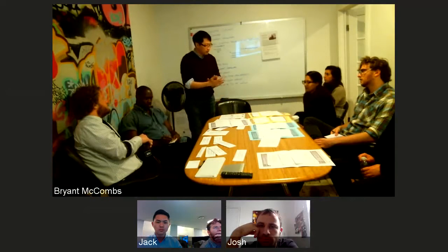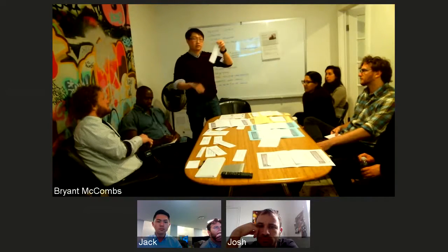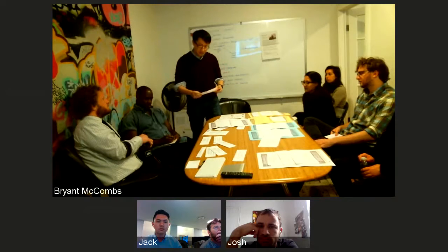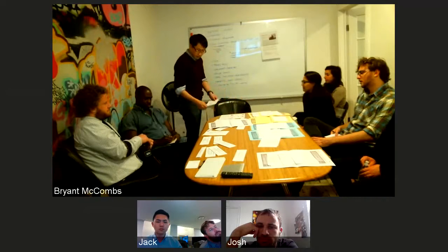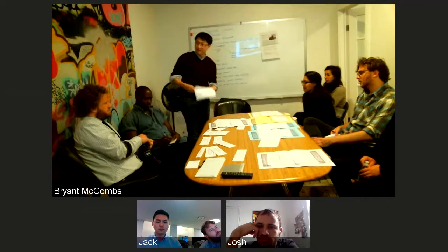So every week, this would be regenerated by the project managers. Sometimes cards would end up smaller after the previous week worked. Sometimes they would end up bigger because we realized we poorly architected something. But what it gave you was, oh, this 16-hour card became a 32-hour card.